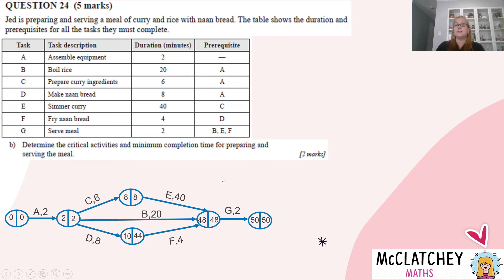Part B now asks us to determine the critical activities or the critical path, and the minimum completion time to get the whole thing done, the whole meal preparing and serving. So we already worked out where the critical path was, but we can double check that it's wherever these two halves of the bubble are the same. So that's our critical path across there. But we do need to state that really clearly. So we're going to state that the critical path is A, C, E, G, and we get our fourth mark for determining the critical activities.